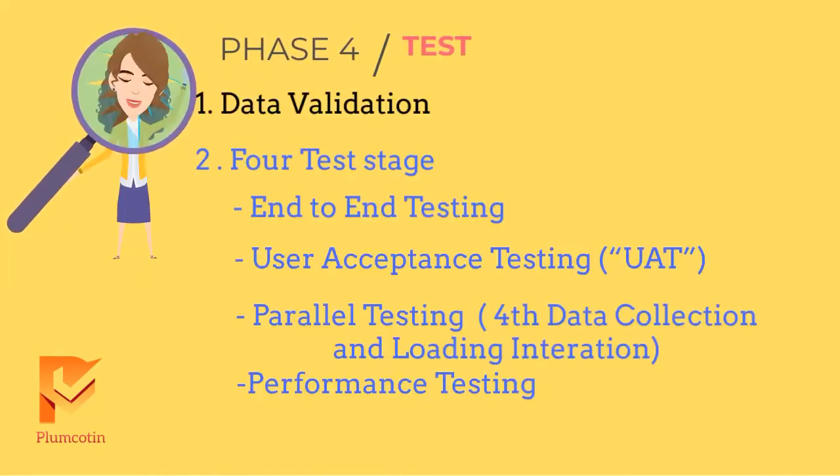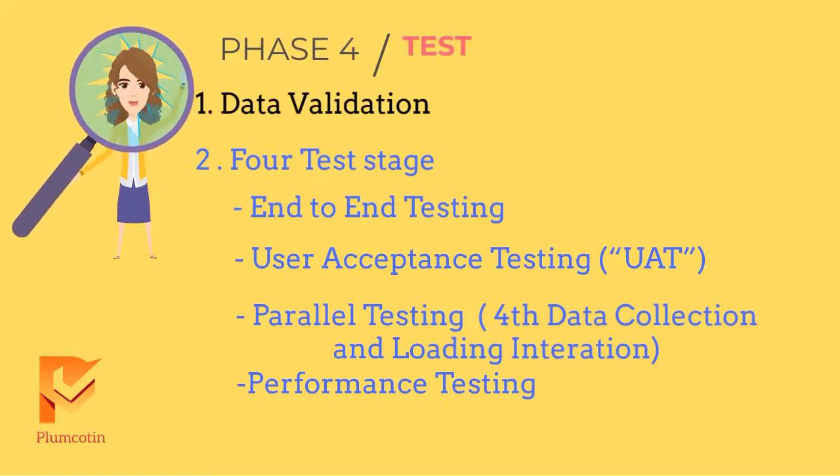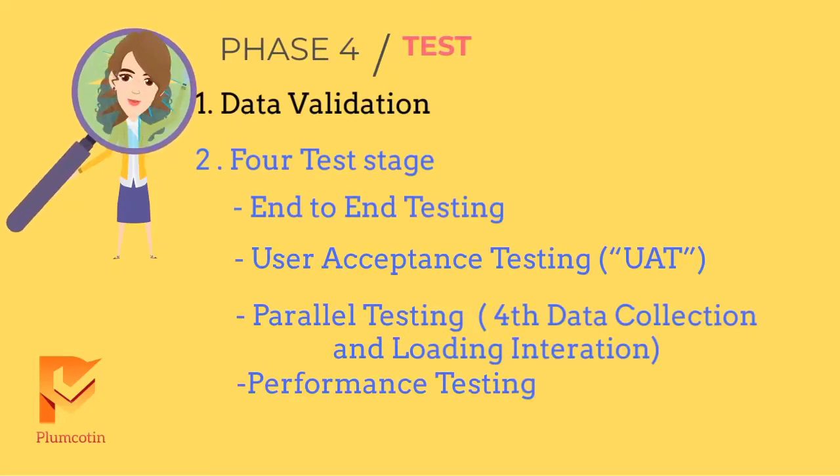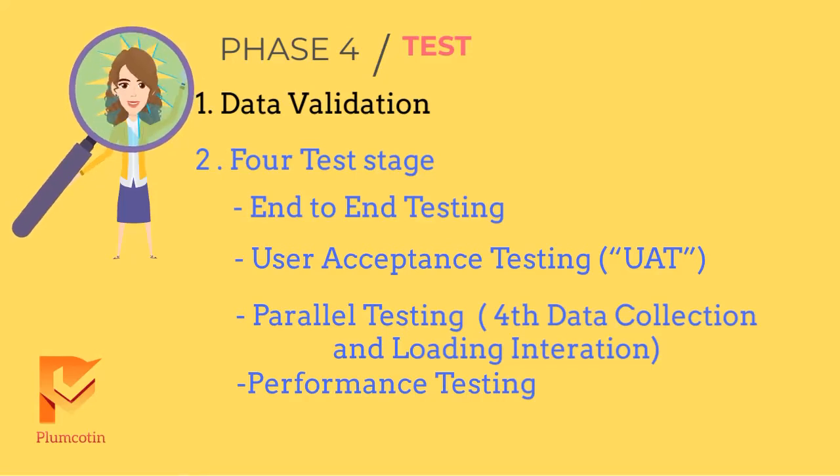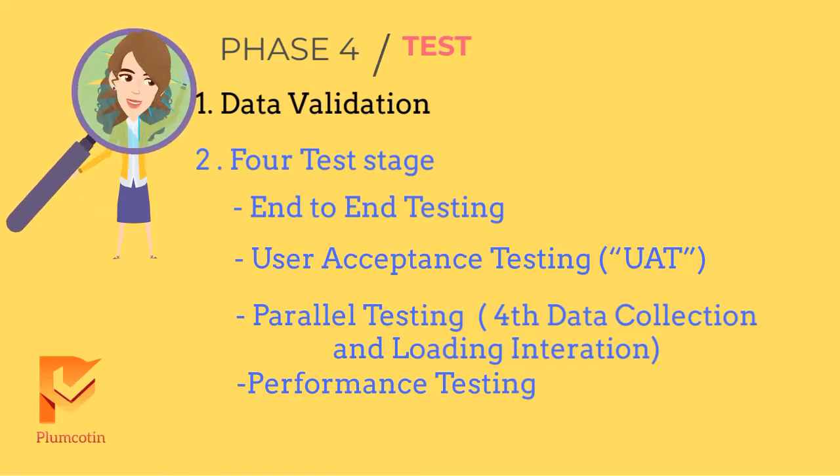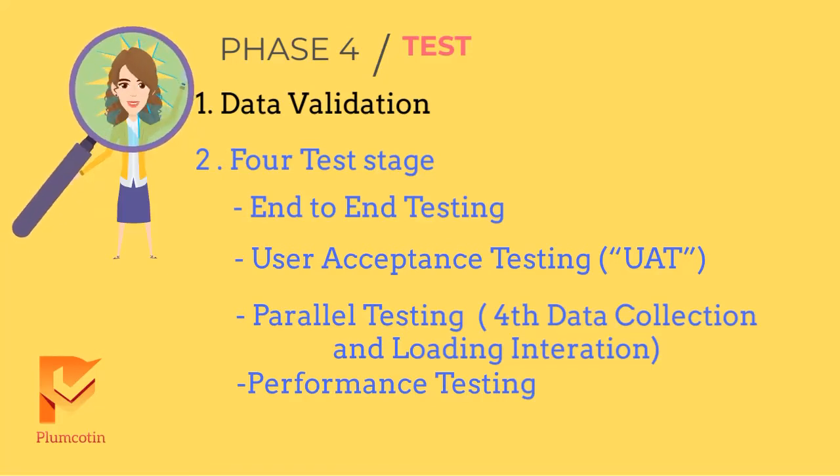The test stage consists of 4 separate efforts. End-to-end testing. A series of test conditions documented and executed to confirm the operation of the configured Workday service and all integrations, utilizing scenarios that span all end-to-end processes and integrations. Any issues that arise will be noted and resolved prior to going into production.